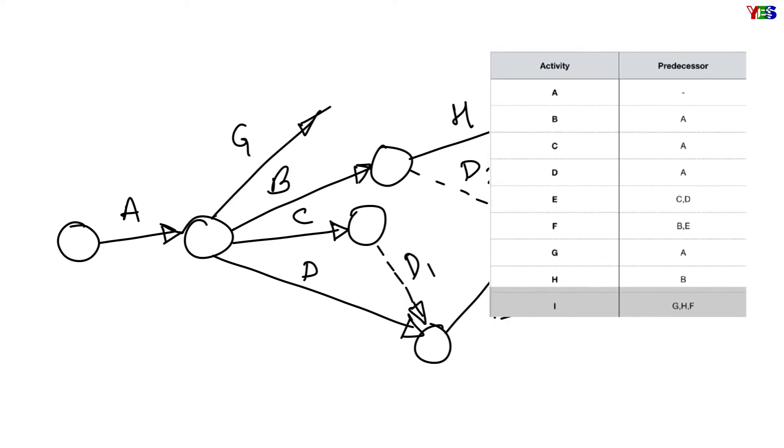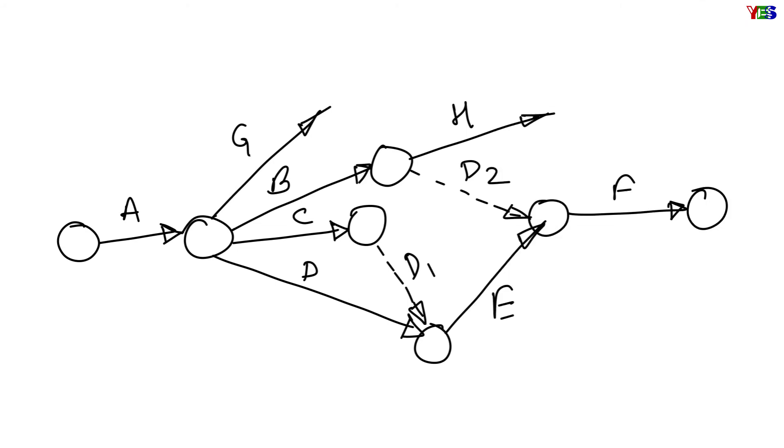And the last activity I we are having here, which has G, H, and F all three as predecessors, so it is clear that activity G, H, and F will have the same head event, and we can make it since they all are having different tail events.